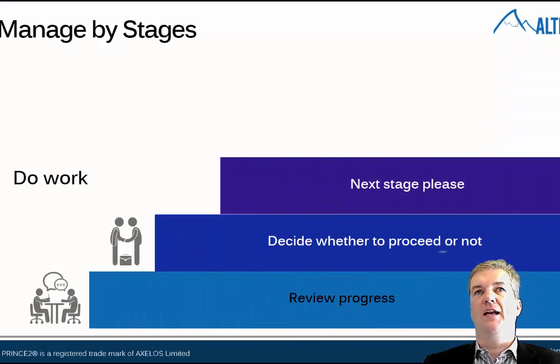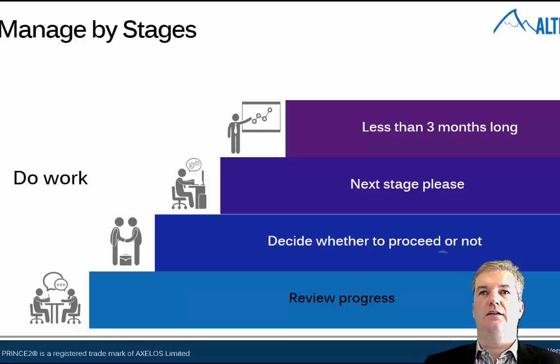Okay, management by stages is another clear area. So what we need to do is set out a stage, do a certain amount of that work, stop, talk to the senior management, make sure we're still on track, make sure that the principles that we've brought up so far, we're still going to get there, decide whether or not to go on to the next stage of the project, or change perhaps some of how you do it, perhaps bring in some of your lessons learned, go back onto the next stage and get in there.